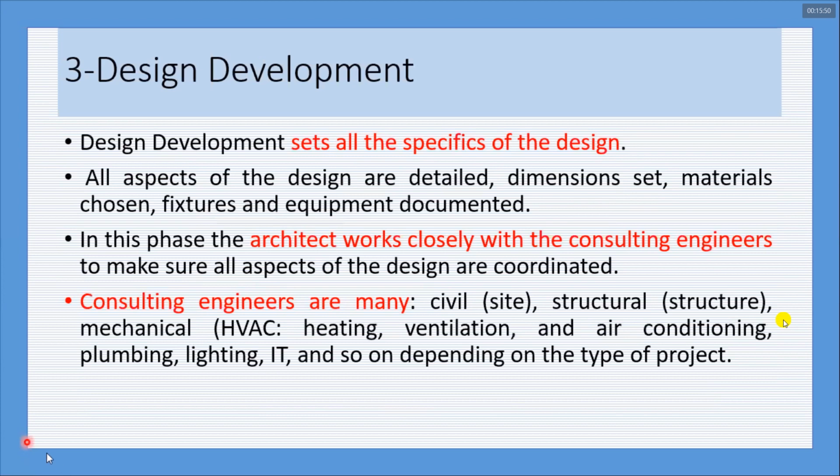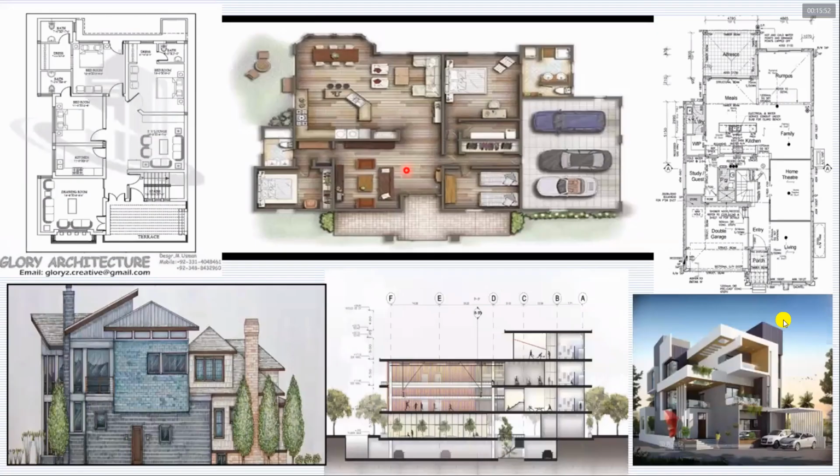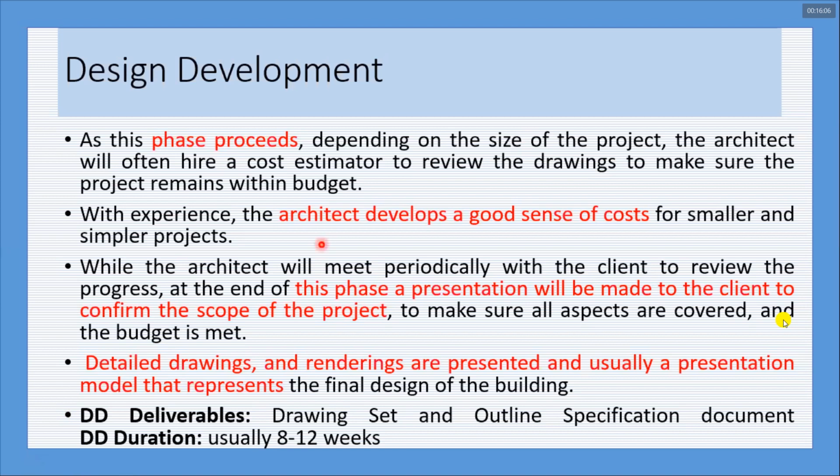This is one of the views of presentation drawings: floor plans, elevation of the building, section of the building, the dimensional plan or working drawing, and lastly the 3D model of the building. So in the design development phase, depending upon the size of the project, sometimes architects roughly estimate the cost on the basis of their experience. But most of the time, for large scale projects, he requests a cost estimator to provide a